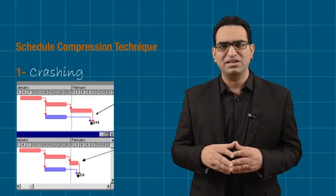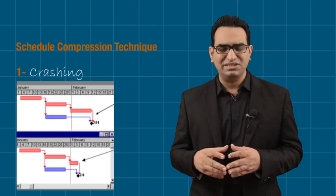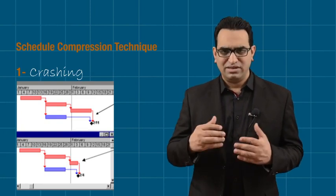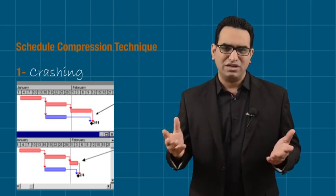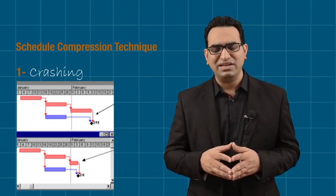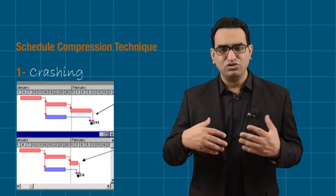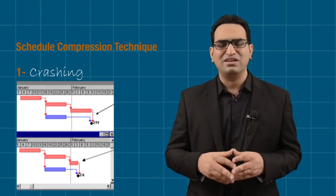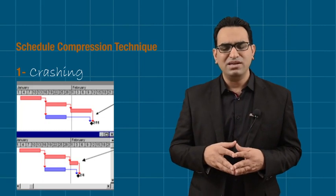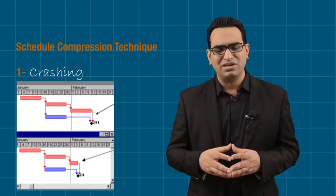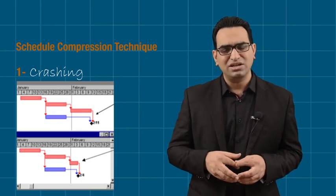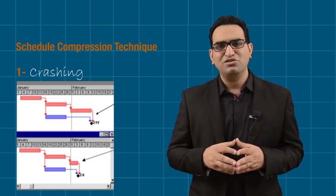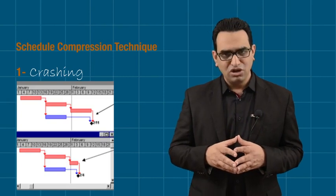Let's suppose we have 5 activities with 3 on the critical path and a total duration of 30 days. In crashing, I reduce one activity's duration from 10 days to 5 days by adding working hours or resources. When I trade time through crashing, I have to increase my cost. So crashing impacts the overall project duration, but the cost is increased.